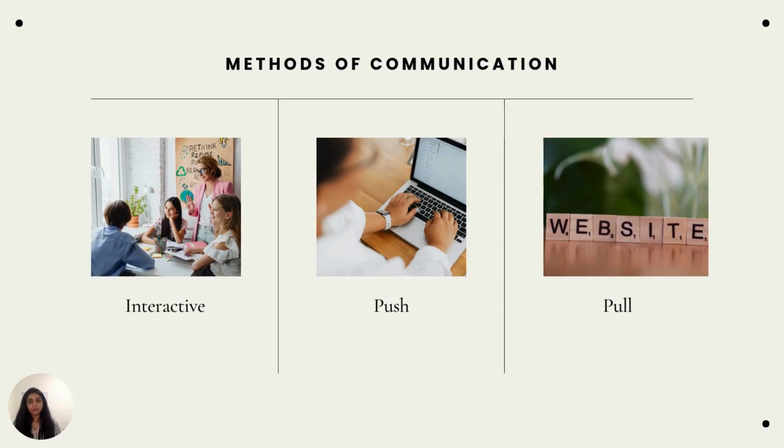While pull communication is a kind of repository, the recipient accesses the information at their own leisure. The sender is responsible for storing and organizing the information. For example, intranet sites, websites, SharePoints, lessons learned repository. It is for large volumes of information or general documents that stakeholders need to access on demand. So if you need the information on demand, this is the best tool.